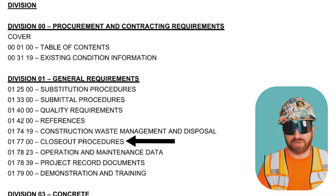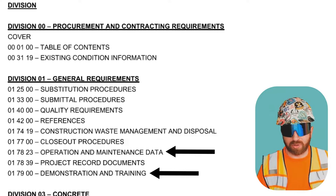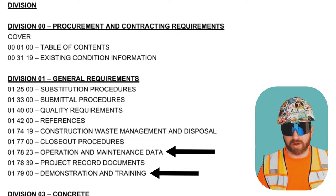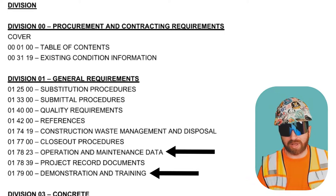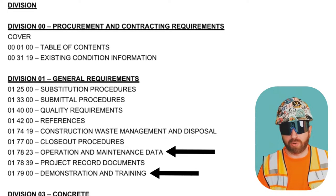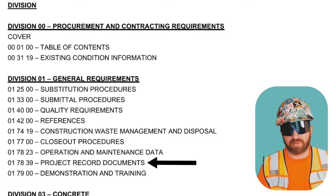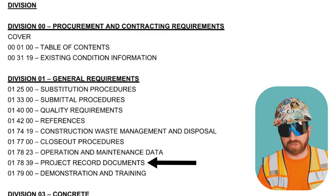Closeout procedures are everything you need to do at the end of the project. Operation and maintenance data — when you turn over a new building, your owner typically doesn't know how to use everything within it. This section outlines what you need to turn over and how you need to train your owner so that they're ready to use their new building. Project record documents is everything you hand over to the owner as part of that final package, including warranties, substantial completion letters, occupancy permits, and so forth.